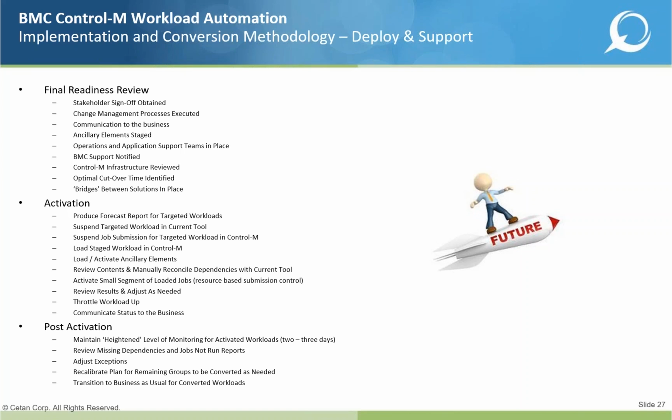the post-activation. And post-activation really is making sure that there's still a heightened level of monitoring and a heightened level of support for a couple of days for each activation grouping. And that way too, if there is something that pops up, we're there and available to work with the team to rapidly respond and react and make adjustments as we need to.